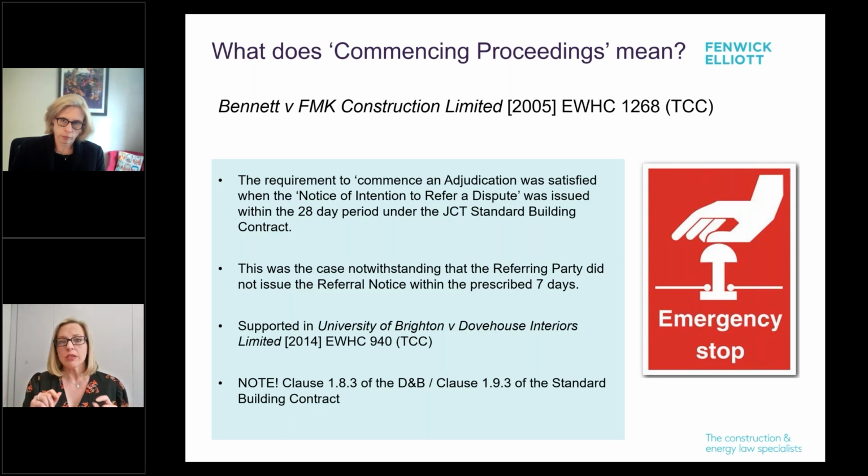It's worth remembering that commencing the proceedings only suspends the final statement or final certificate becoming conclusive. Clause 1.83 and 1.93, respectively, of the D&B and the standard building contract state that any proceedings will be treated as concluded if during any period of 12 months after the issue of the final statement or certificate, neither party takes a further step in them. So it's not possible to put an indefinite hold on the final statement or certificate becoming conclusive simply by issuing a notice of intent to refer. You need to take further action to conclude that dispute within 12 months.